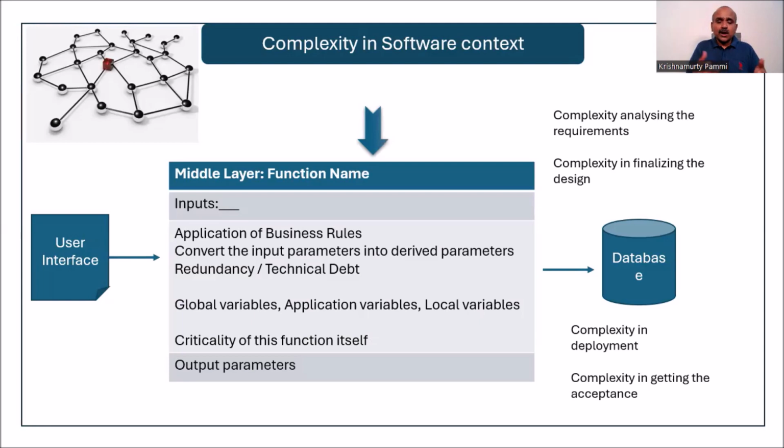So people say, why have you taken these many hours or story points for this? Then you have to say, the requirements that are provided to us is at 30% detail. To make it known to the technical team, we require certain effort in terms of understanding those things. That's why we are claiming certain story points for complexity. Okay, if you don't want us to claim story points under the head of complexity in this scenario, then better give us definition of ready, very detailed user stories.